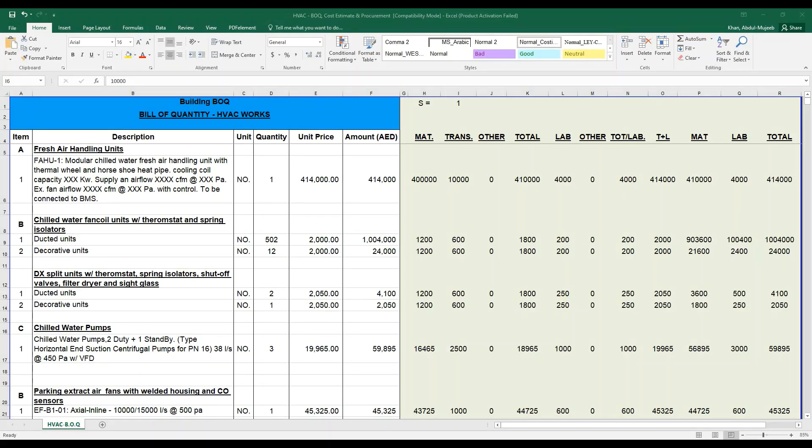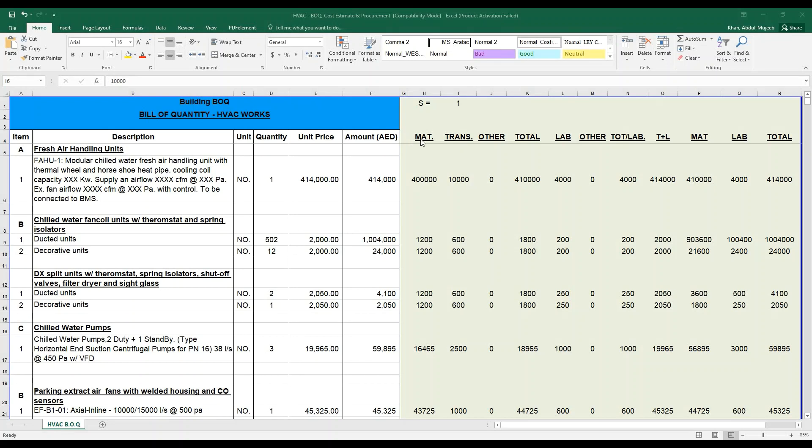Here you can see an example of a bill of quantity for an HVAC work. Let us begin with the main items: the item, description, unit, quantity, unit price, and amount. Amount here is taken in AED, which is Arab Emirates Dirham. This is from a sample United Arab Emirates project. Main actual total, the transaction cost, the other cost, the total of these both.